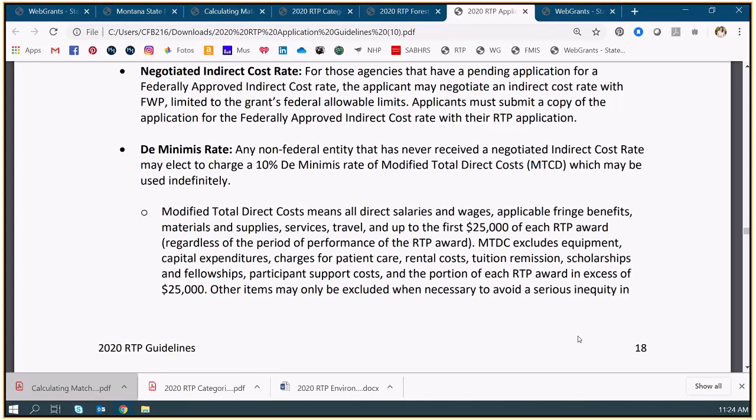Maybe you'll get into this, but I did have a question about project coordination costs. So, like, somebody specifically being paid to coordinate the project, including reporting, as well as for a construction grant. Project coordination costs will get tough, because first and foremost, you need to be able to say that person is specific to this RTP project. If so, you can choose a portion of their time for which they'll be coordinating the project.